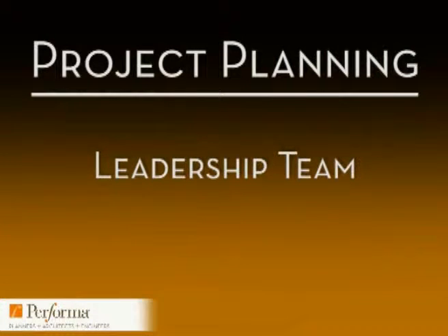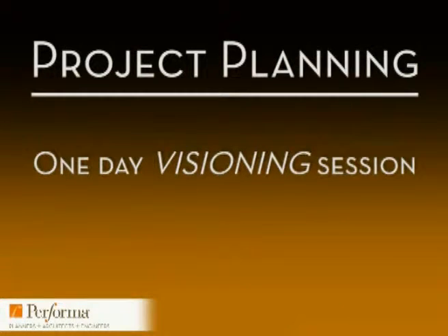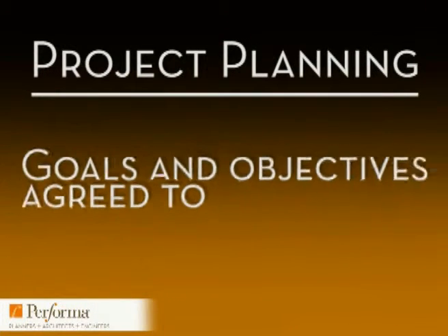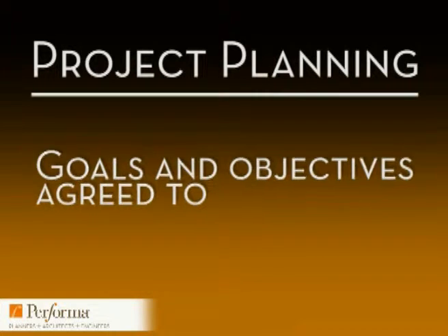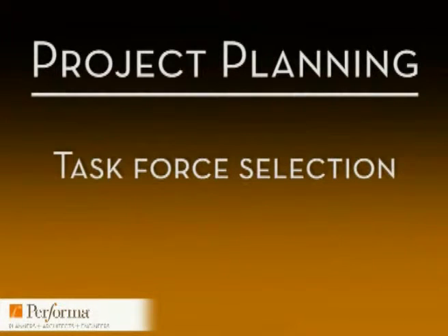And what we're trying to do in that step is conduct a one-day visioning session where all of the goals and objectives of the project are agreed to and discussed. Without that, you are lacking a roadmap for the future steps that follow. You can then begin to select your task force because you now know what the goals and objectives of the project are. You need to prepare them, and then you can begin with your workshop.